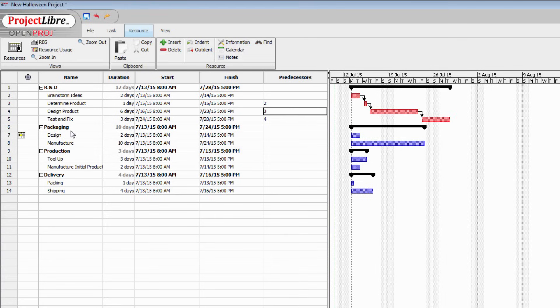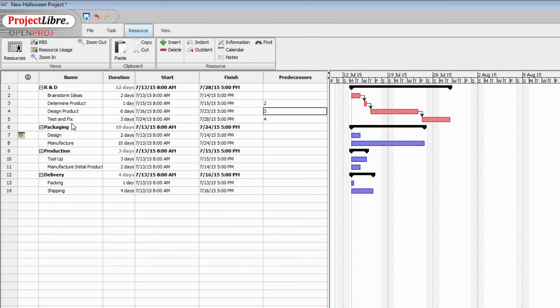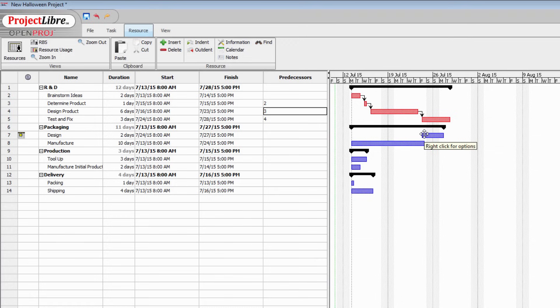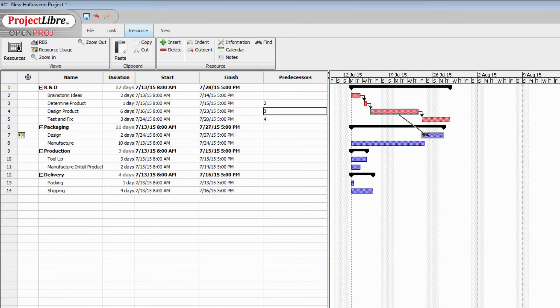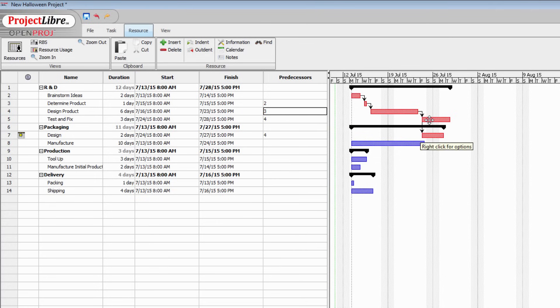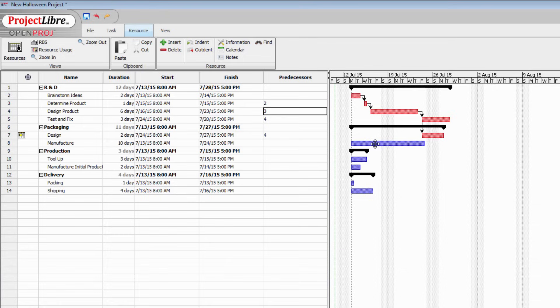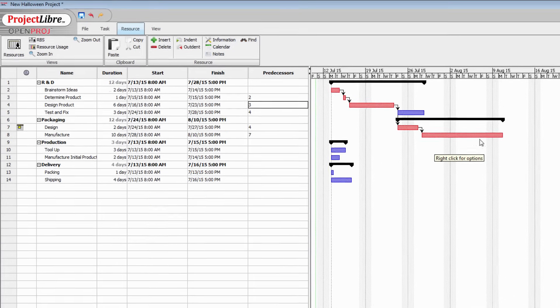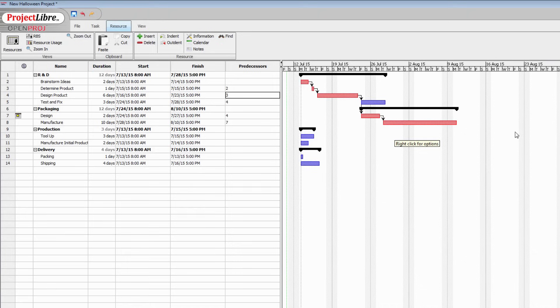Now in terms of designing our point of sale packaging, we can start that as soon as we've finished designing the product. Basically, while we're still testing and fixing it because we know what it's gonna look like so we know the kind of packaging that we need to design for it. So I'm just gonna grab this and start moving it. It can start at the same time as this task can. But of course it's dependent on the design of the product being complete. So we're gonna create a dependency here. These two items can start at the same time but they're dependent on this task taking place first. Of course we can't start manufacturing our packaging until we've designed it. So there's another dependency here. And this task is also on our critical path. It's a critical task. If its time expands beyond the 10 days that we've allowed for it, it's going to push out our delivery date.